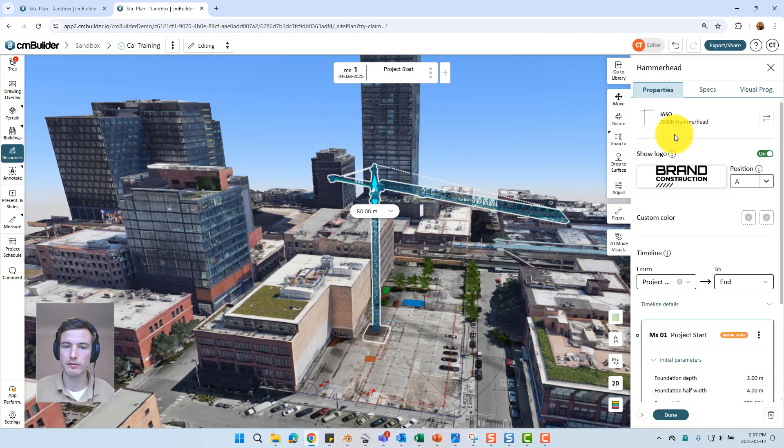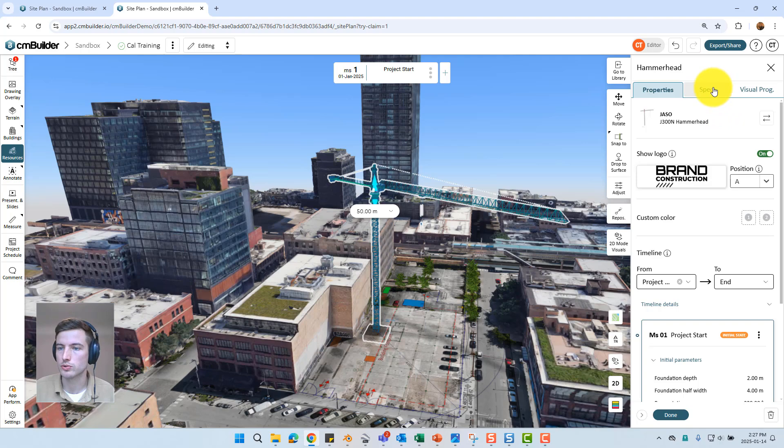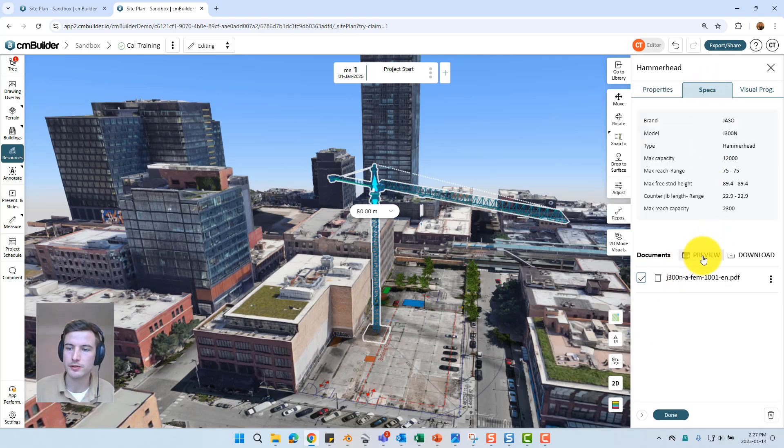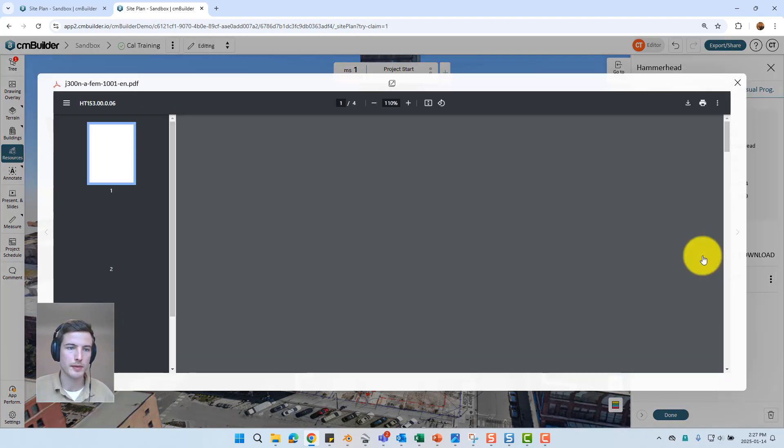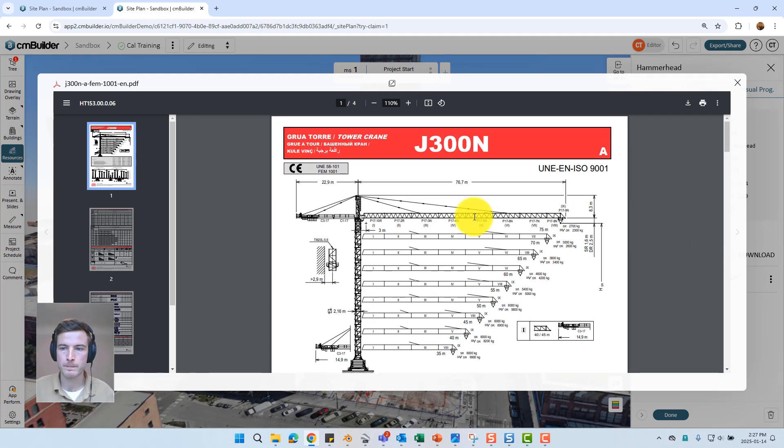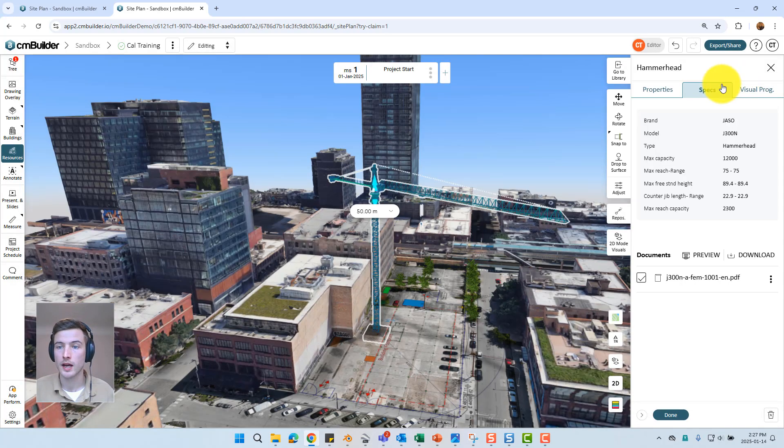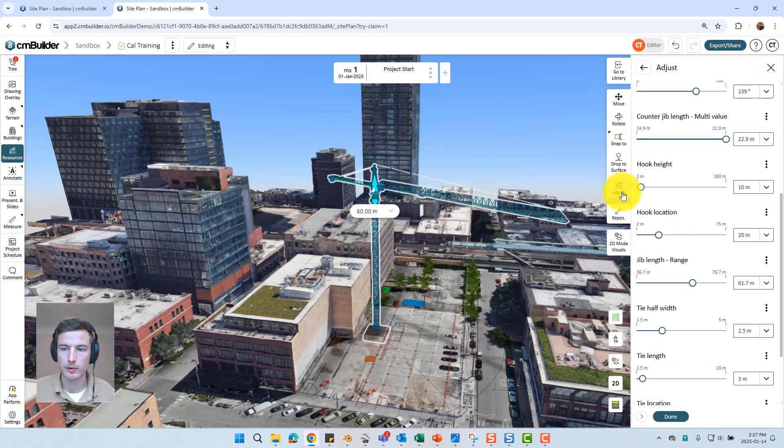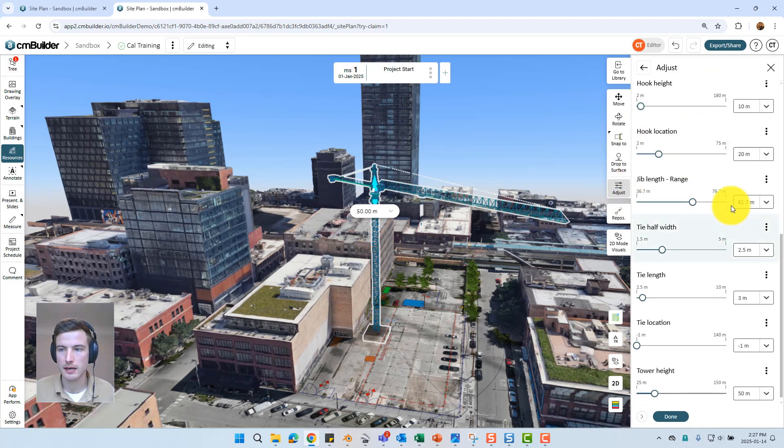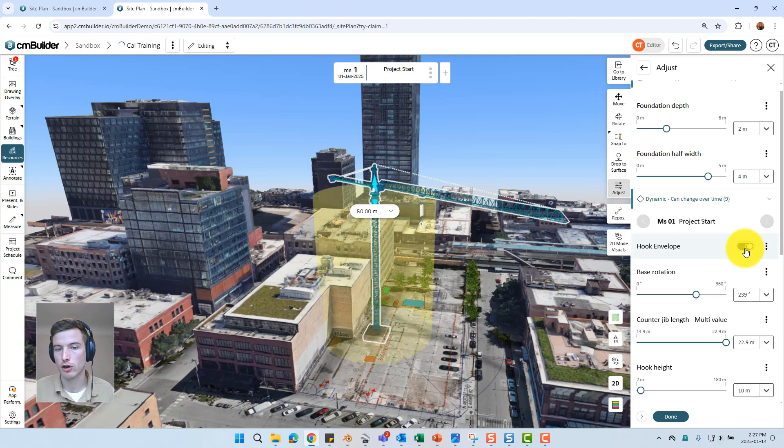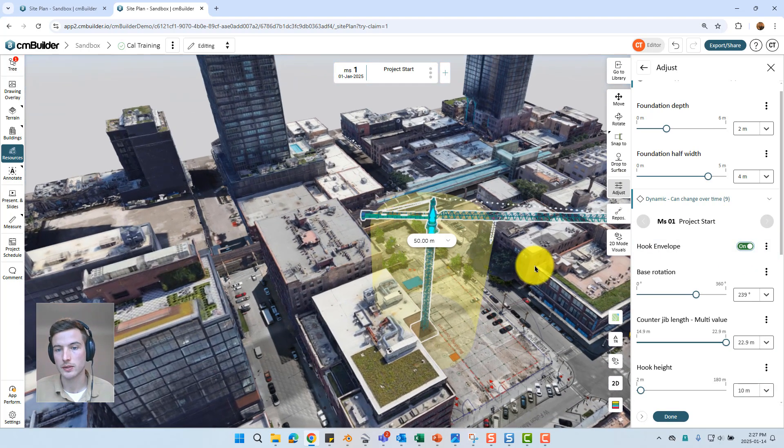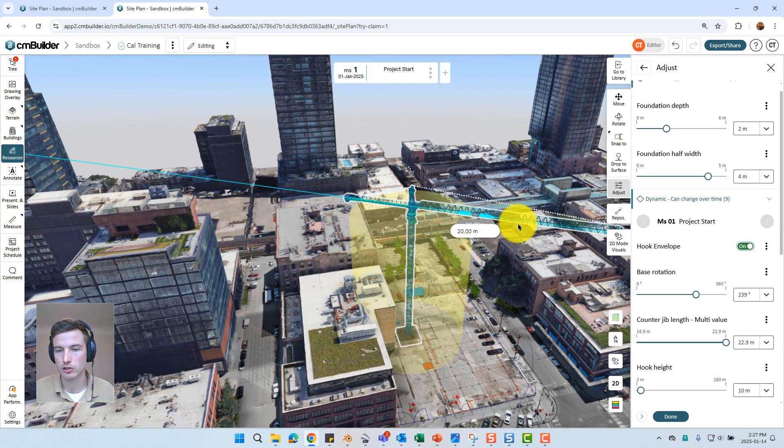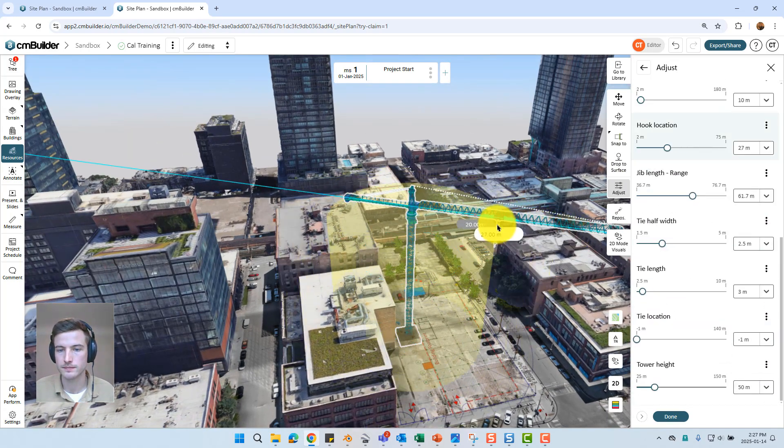However you don't have to take our word for it at any point. You can just go to the specs tab of the resource. Select this checkbox and preview or download the manufacturer specification straight to the platform. You're also able to easily validate crane picks by going to the adjust tab. And toggling on or off the hook envelope just to show exactly what this crane can reach at this particular hook location.